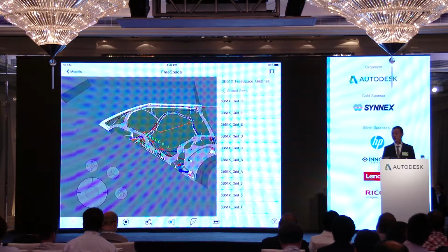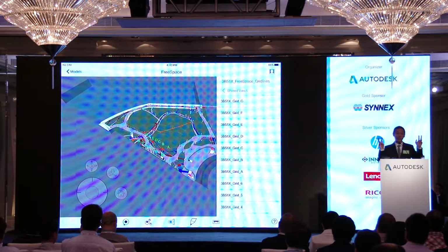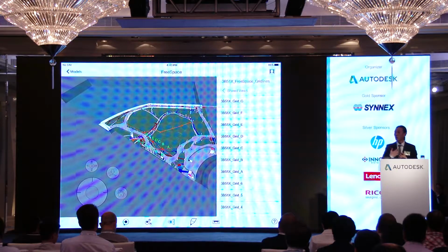And the chief architect has actually approved the model and said no mock-up is necessary because a mock-up takes about 2 to 3 months to build. I've been coordinating my model 3 weeks with the chief architect, and he approves everything. And I issued a DWG drawing for them to crack on with, in their DGN format submission. But as long as I issue DWG, I know that all disciplines are coordinated.